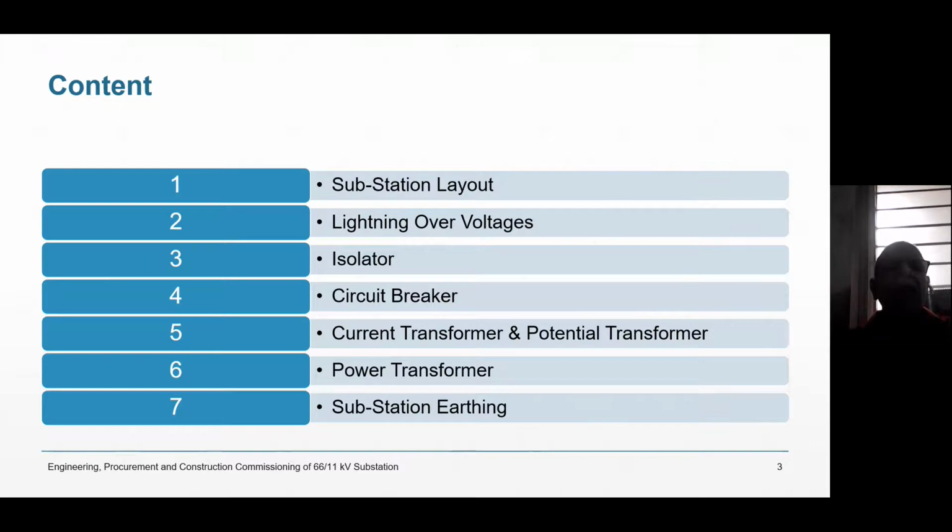It is not difficult. Then I have to say that you can add your price bid, because in engineering, the price bid is never opened first. First, only the technical bid is opened. Only the persons who are technically qualified, their price bids will be opened. That is what I had to do, and CT manufacturers know the ins and outs of CT. I was not a CT specialist.